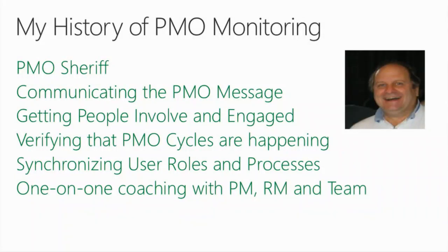Also, the PMO is all about communicating. Being a focal point, people need to know why this PMO is so important. People are sensitive. If they're sending in timesheets, and then they stop and nobody says anything, they feel like nobody cares. So it's important to remind people to get those timesheets in or those task sheets. Even the project managers are sensitive. If you're not looking at their schedules, they just don't think anybody really cares. And then 6 months comes down the road and you say, you haven't been updating your schedule. Well, nobody's been asking me to update the schedule. So it's important to get these wheels going.